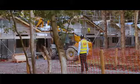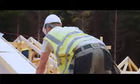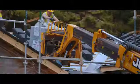So basically, we have a guy and he observes work for a period of time. In this instance, we used blocks of 1 hour, and in that he timed each individual as to what he was doing during that period. So all of his activities are then classified into three areas. They're either a value add, a support activity, or they're waste.